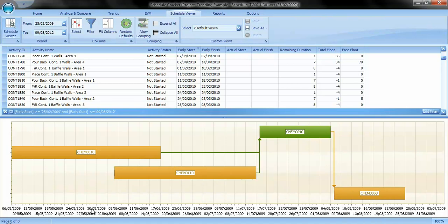Bar lengths are proportional to activity durations. Internal bars within an activity represent progress of the activity towards completion.